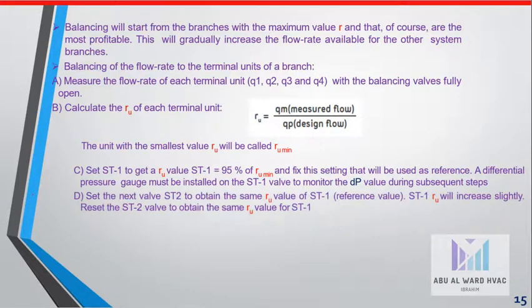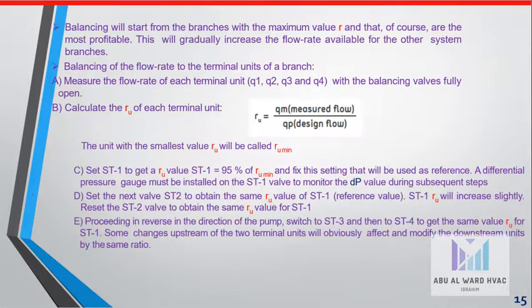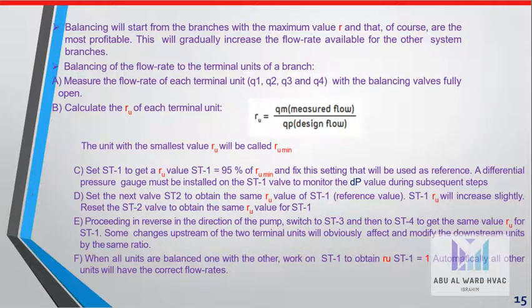A differential pressure gauge must be installed on the ST1 valve to monitor the DP value during subsequent steps. Set the next valve ST2 to obtain the same R_u value as ST1 reference valve. The ST1 R_u will increase slightly. Set the ST2 valve to obtain the same R_u value for ST1. Proceeding in reverse in the direction of the pump, switch to ST3 and then to ST4 to get the same R_u for ST1. Changes upstream of the terminal units will obviously affect and modify the downstream units by the same ratio. When all units are balanced, work on ST1 to obtain R_u ST1 = 1. Automatically all other units will have the correct flow rates.